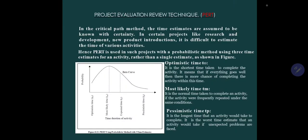This is PERT. What is PERT? Full form of PERT is Project Evaluation Review Technique. In the critical path method, the time estimates are assumed to be known with certainty. In certain projects like research and development, new product introduction, it is difficult to estimate the time of various activities.